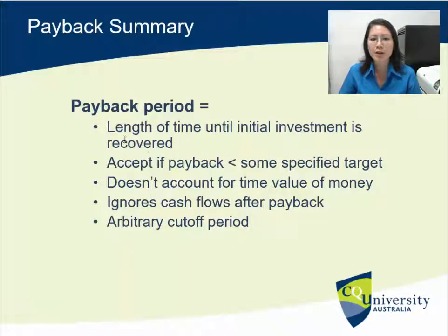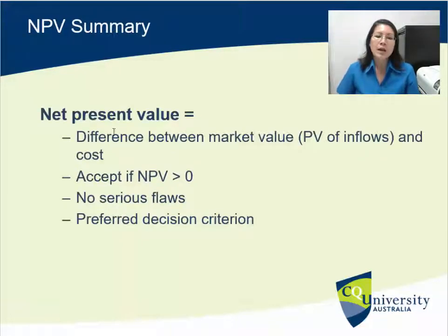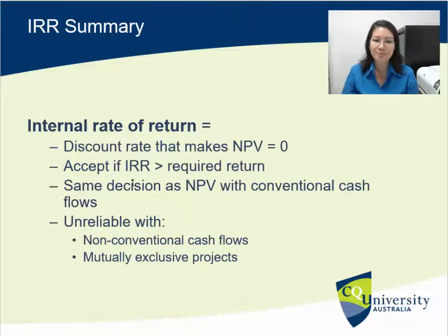Payback period summary. It's the length of time until our initial investment is recouped. We accept it if it's less than our specified or preset limit. It doesn't account for the time value of money, ignores all the cash flows after that payback period, and it's that arbitrary cutoff period. Net present value is the difference between the present value of our future cash flows and the initial investment. We accept it if net present value is positive. There's no serious flaws and it's our preferred decision criterion.